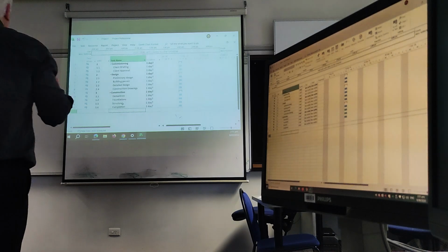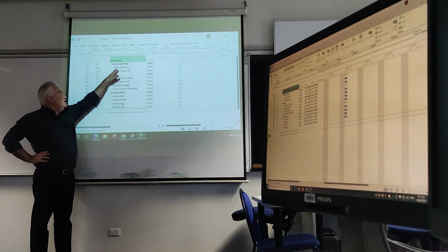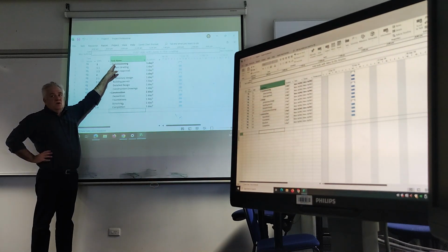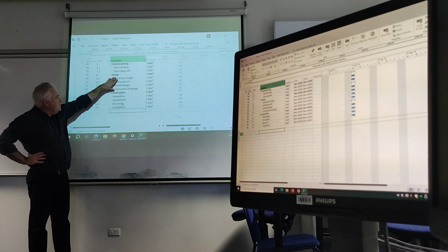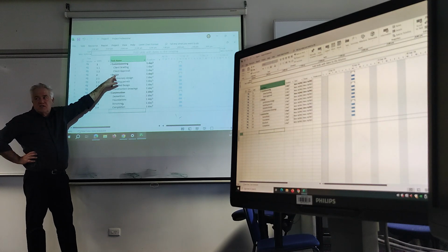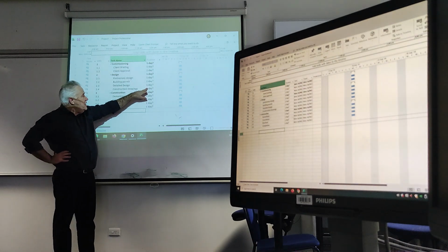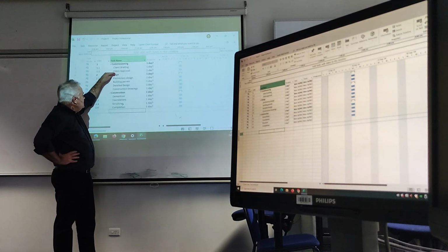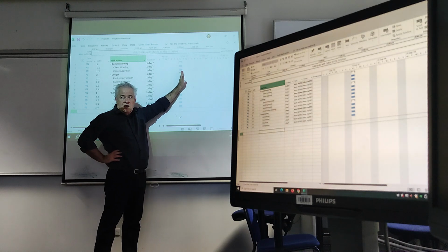Okay, so you can see that you've got these ones here that are not bolded, and these ones here that are bold. What's happened is when you indented it, it moved those over and said those are children tasks. This is a summary task. It summarises everything that's here. It does not add them up. This number here is not 1 plus 1 plus 1 plus 1. It says these tasks here, how long is it going to take? At present, it says one day.